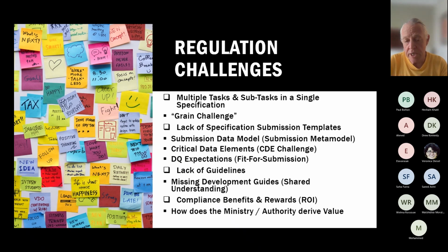And the problem as well is that those tasks and subtasks within the specification are across different resources. So you can't just say, all right, this resource must do this one specification. You'll have everything from a DMMA to a data strategy to vision to prioritization to resource and planning, all within that one area.